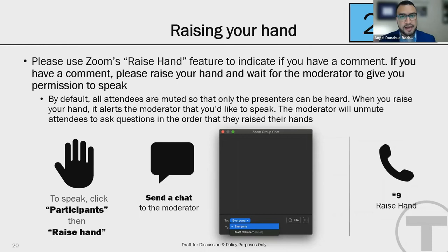Yep. Thank you, Mr. Caruso. We've been working really closely with Mayor Fuller and the delegation since we had that public meeting, I believe, in October. Jillian, please correct me if I'm wrong here, but I believe that under the CIP, the full design of 100% of these three stations is included. I don't know the exact amount, but these stations are really complicated to design. I don't think we've hit 50% design yet, but I think we presented at about 30% design in late October. We are still working on figuring out that question that you mentioned. And as I said, that is a question that is still being asked by the delegation, and we've been working in close coordination with them since October. And over the last month, we've been meeting on a weekly basis to try and discern that.